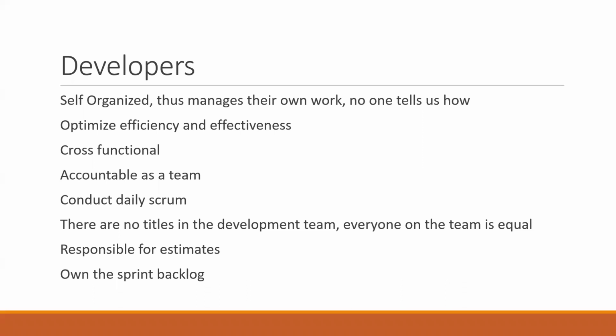Then you can identify, per sprint, the velocity of the team. First of all, you need to know the total. Then you can start putting it into individual sprints and seeing how much increment you can deliver on that specific project or initiative. But if you don't have that high level conversation, there's no way it will be easy for you to get the velocity that the organization needs for that specific project.